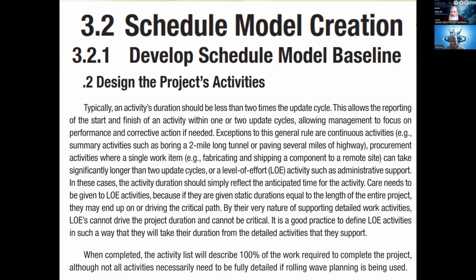You might not have heard about it, but this is a very solid way of taking the progress. Naturally, there's a wrong conception that you physically measure the work which has been done and according to that give the progress. That is absolutely wrong. Actually, sum up all the activities that have been declared done.